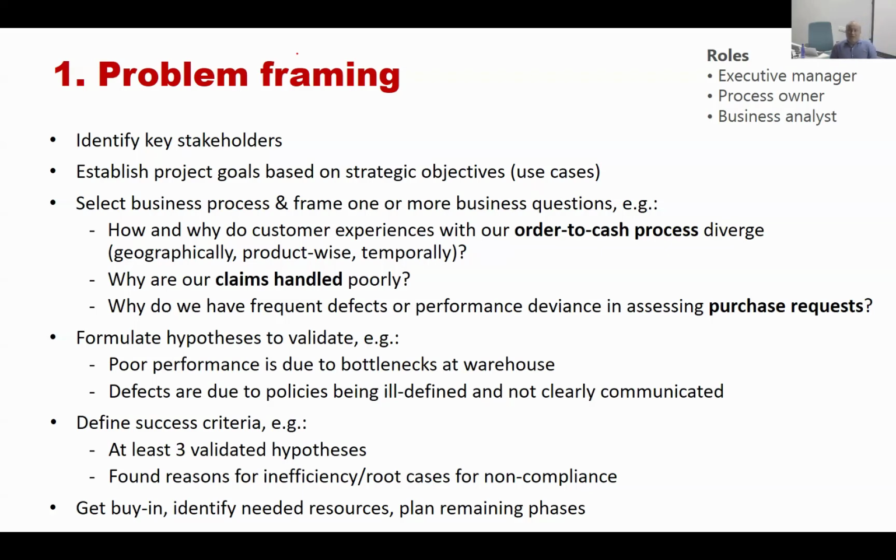It's very important. All of these, you usually try to put in a 1 or 2 pager that has the title of the project, a description of the goals, a description of the questions, performance metrics that you want to improve, possibly some hypotheses you start with and that you wish to validate, and then some success criteria. And you get everybody to agree on this 2-pager at the onset of the project. And of course, it will be revised as the project unfolds, but this initial understanding can save you a lot.